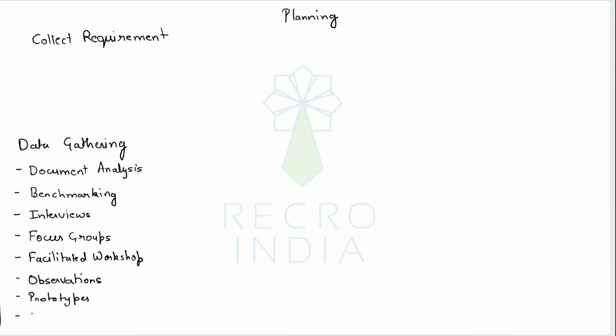Coming to another technique here: questionnaires, surveys, especially when you are dealing with a large group of people. Say, for example, I want to develop a new attendance system and I want my entire organization, all the employees, to provide feedback in terms of what they expect in this new attendance system, and we have an employee count of, let's say, 3,000 people. Obviously, I can't go in and do focus groups or facilitated workshops with all of them. So this is where questionnaires can help me.